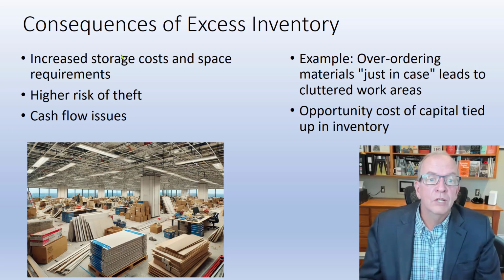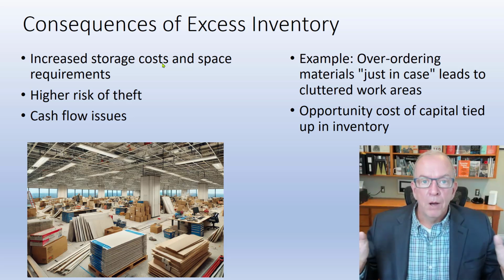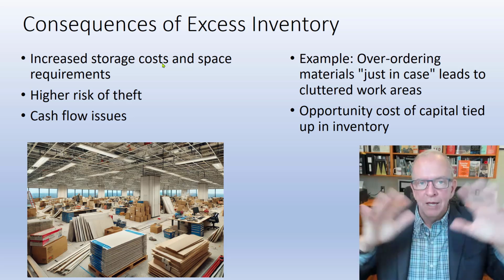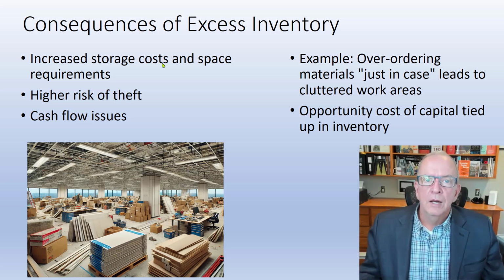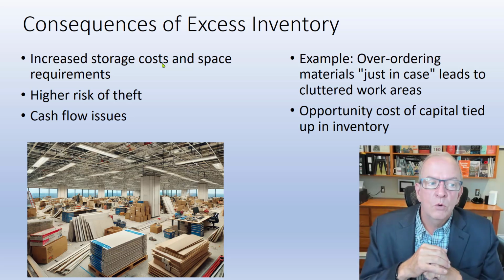And some other consequences of excess inventory, right? Because of the spatial requirements, maybe you've got to rent extra boxes, we call them C-cans, the metal container boxes, and store the material in them. But that has a monthly cost to it. So that's an excess storage cost that we don't necessarily need, perhaps.